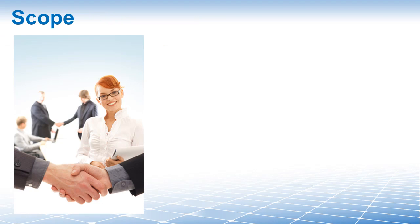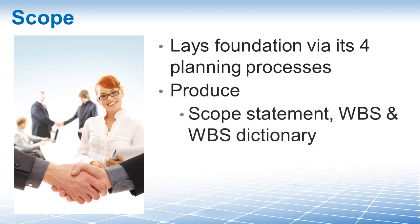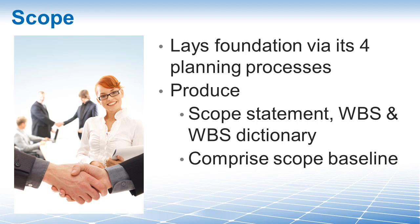Before we discuss key concepts, let me go through a few more pointers on project scope. Project scope management lays the planning foundation through the four planning processes. This is where we define how the project scope will be defined, validated, and controlled. Here we produce the scope statement — which often contains scope description, acceptance criteria, deliverables, constraints, and assumptions. We also create the WBS and the WBS dictionary. These three items — the scope statement, the WBS, and the WBS dictionary — make up our scope baseline.